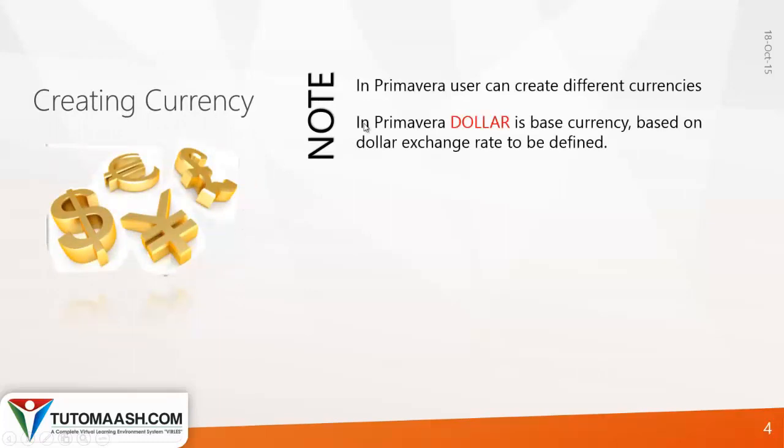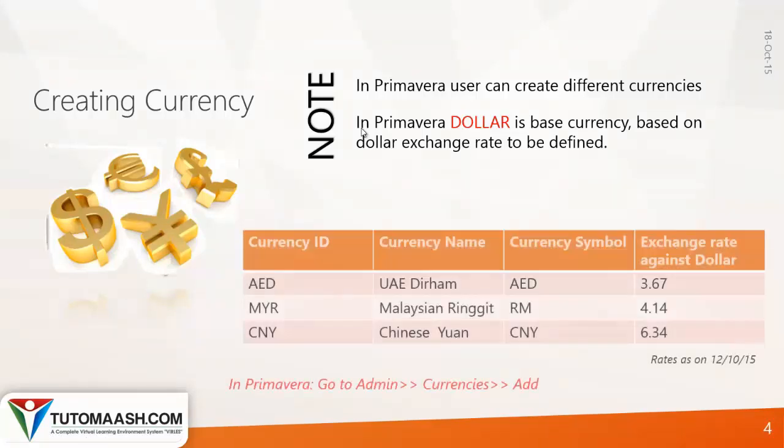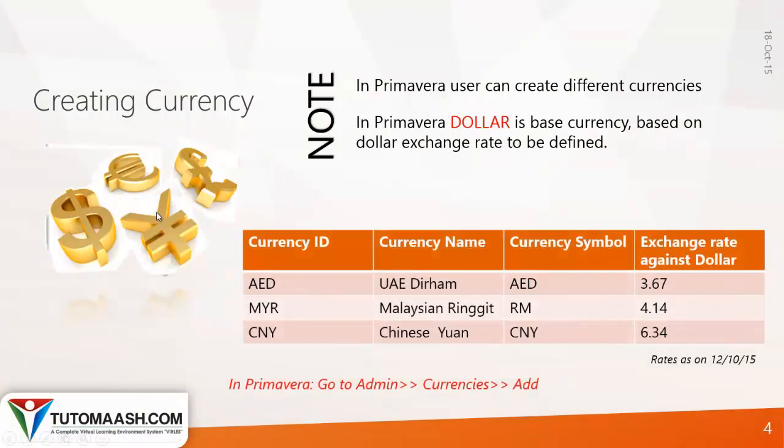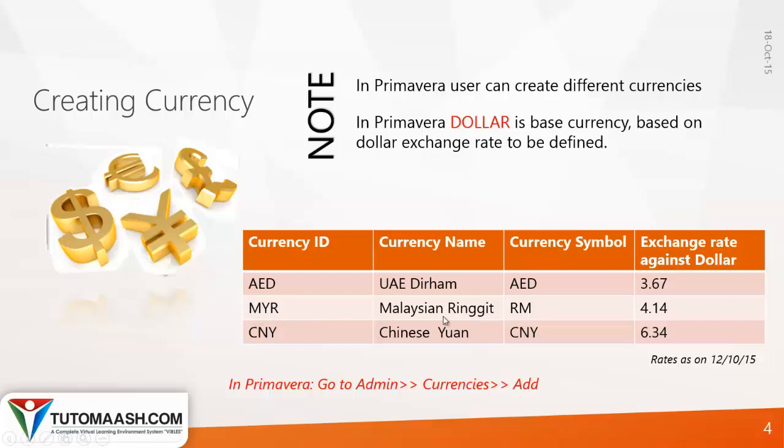Apart from US dollar, there are some default currencies as well. But if you don't find the currency you're using in your country, you can create it. When you create that currency, make sure you give the exchange rate against US dollar. For example, for Malaysian ringgit, the currency ID is MYR, currency name is Malaysian Ringgit, currency symbol is RM, and the exchange rate against dollar is 4.14.